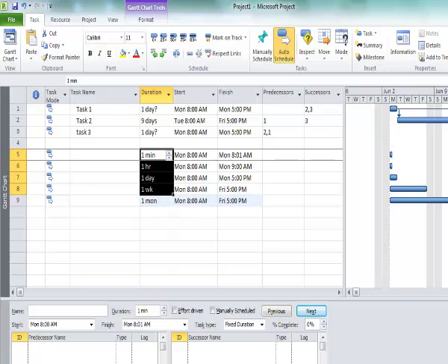I'm in the IT business. If I'm scheduling tasks in 1 minute increments, there's something wrong with me. A rule of thumb is you should never have durations less than 2.5% of the total project duration. So if you have a 2-year project schedule, you shouldn't have anything less than 2.5 weeks as a duration. That's a rule of thumb that can help determine if you're getting too detailed. You always want to make sure you're not creating a simulation when you create a project schedule. You're creating a schedule to manage things. But the good thing is, if you need tasks down as little as a minute, you can do that.